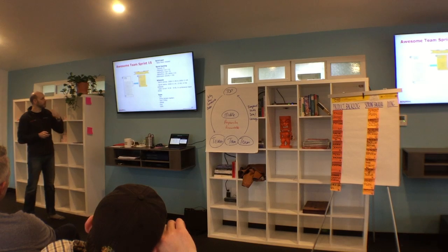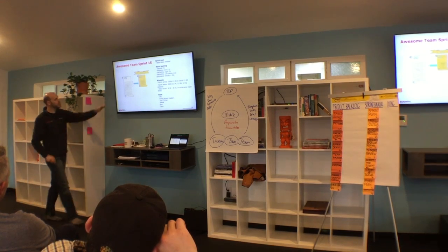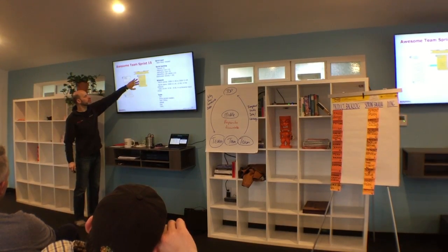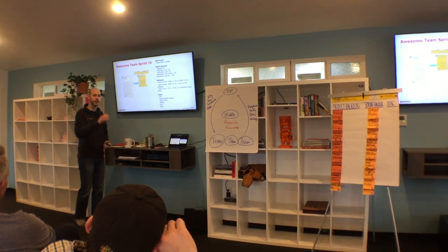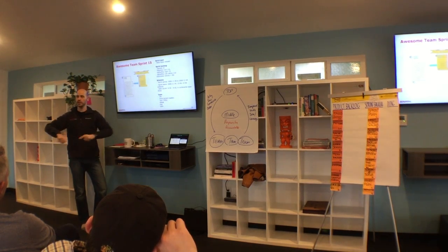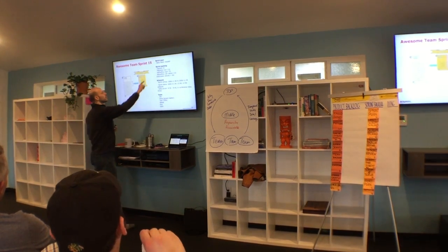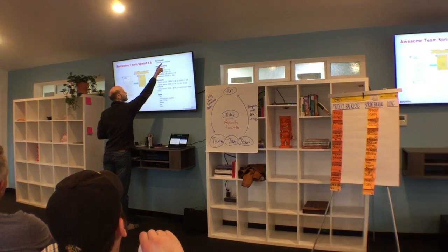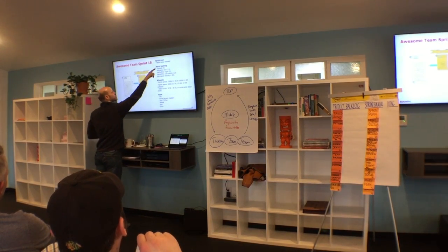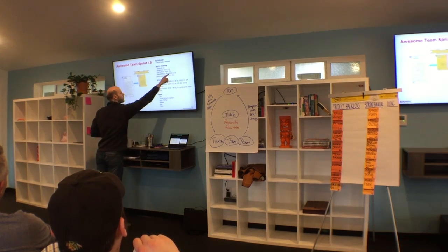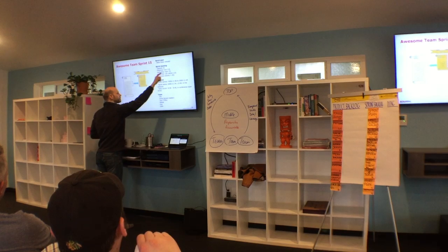Once the team has agreed on the sprint goal and their initial plan of how at least today they think they're going to get it done, they do write big and visible. This is typically a poster in the teamwork area, or if we're a distributed team, everyone's desktop background. They'll write the sprint goal. In this case, they chose beta ready release. The sprint backlog consists of these work items, and here's their estimated velocity, which is their yesterday's weather.